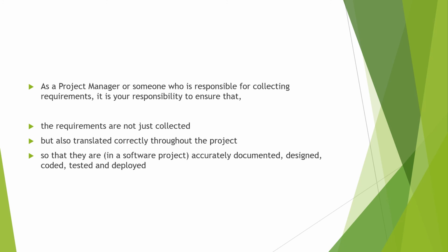But then if the tester is testing on something else, if the tester is testing, let's say, what is the background color of the website, if that is what they are testing, then this entire requirement is in the soup, because the testing was not done. You need to make sure as a project manager that the tester also tests whether the website, the tool, the product of the project is able to process 100 transactions in a minute, right?